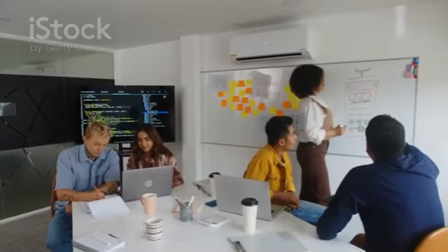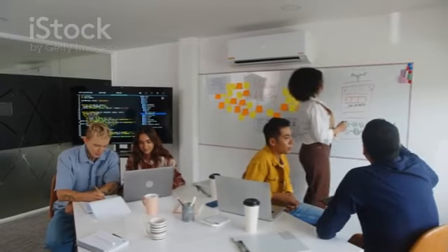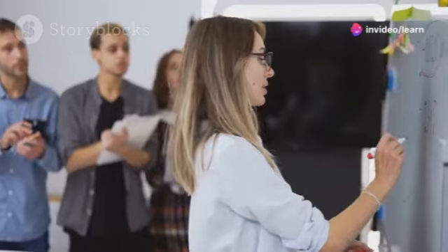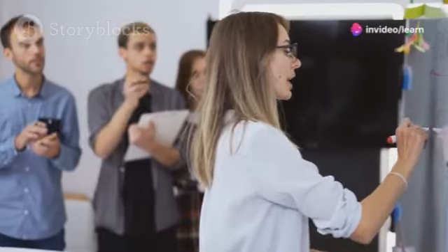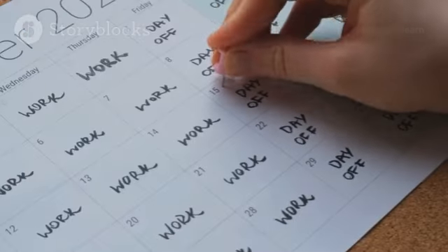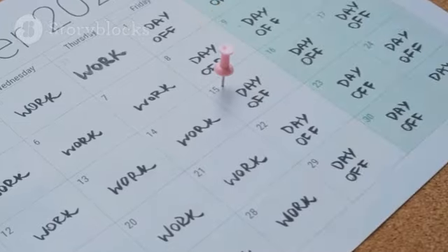The first step to a good sprint plan is knowing how much your team can actually accomplish. To do that, you need to understand your team's capacity. Start by identifying who will be on the team during the sprint. You need everyone's name so that you can then list everyone's availability. Someone might be on vacation for part of the sprint or only working part-time. Be sure to capture all that.